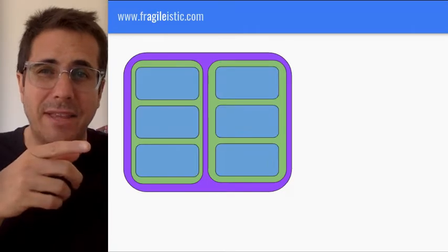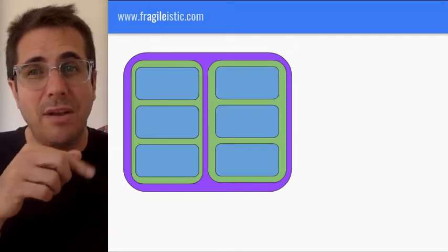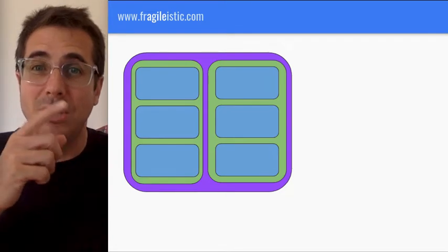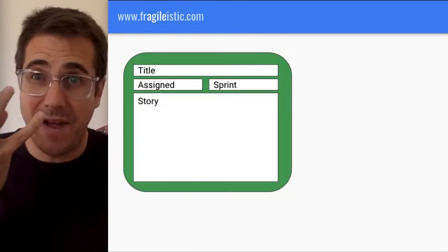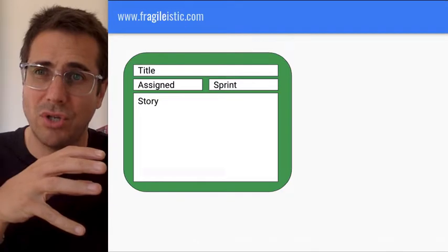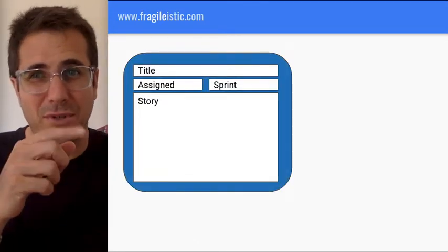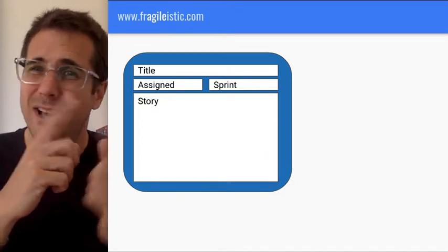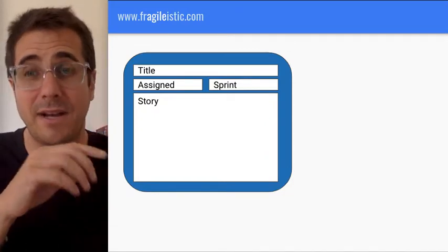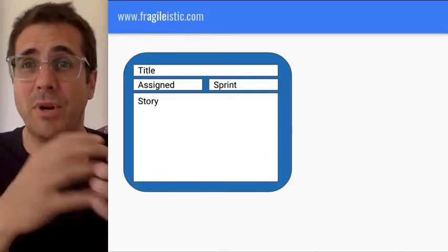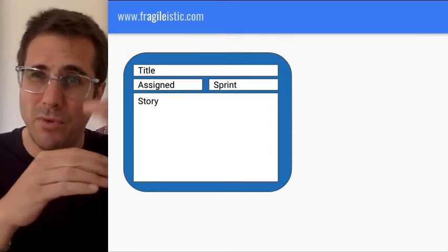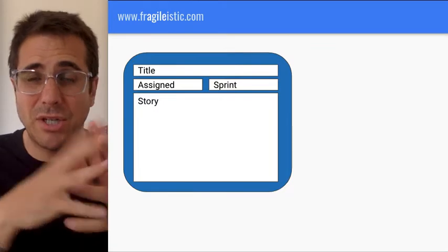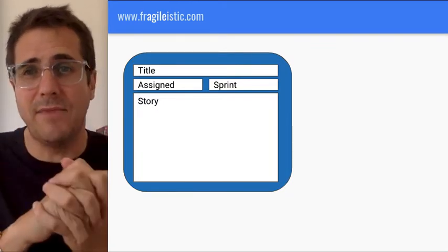And then inside that, there are tasks. I'm really going to focus on trying to get everything refined, but predominantly I want to see the customer value and the user stories refined. I'm not so fussed, and this is blue because this is Jira, yellow if it's Azure Boards, about getting your tasks refined. That is very much an in-sprint activity. If you want to make your task list, you might do that before the sprint if you've got a lot of collaboration that needs to go on with the team, but really I'd leave that to be in the sprint.